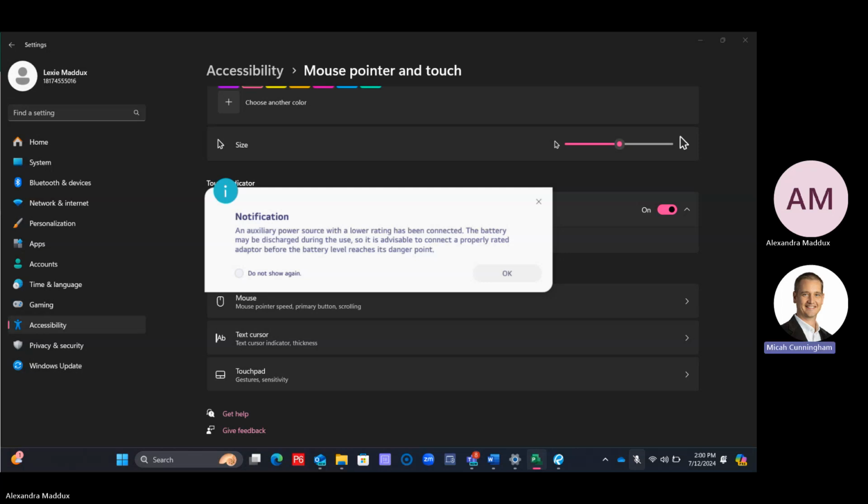It'll keep it tied in with whatever's kicking off the first building, but then you'll have to tie in what relationship you want between the first building and the second building. You don't have to, you can paste it and then delete it.